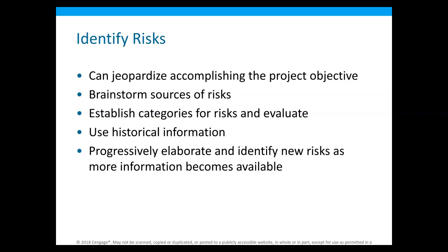So there's a lot of other risks, and we just barely broached the surface. There's certainly financial risks. So there's financial risk if we don't because the federal government's going to fine us. There's financial risk because maybe it screws up our patient billing information, or it screws up our ability to bill insurance companies, which is a big issue. So there's a lot of different risks.